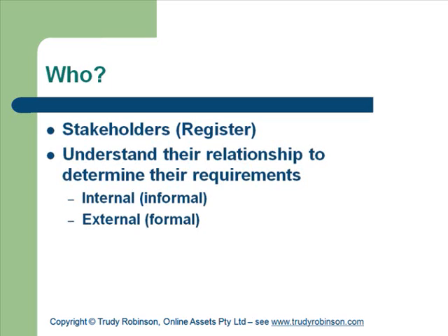Obviously, the people that are going to receive communications, generate communications, or participate in the communication chain will all be listed on your stakeholders register, because that will include everybody: all your clients, all the people that are going to be impacted by it, the whole lot. That stakeholders register will come back into play time and time again throughout your project. And if you find new people you hadn't thought about before, you need to go back and add them.